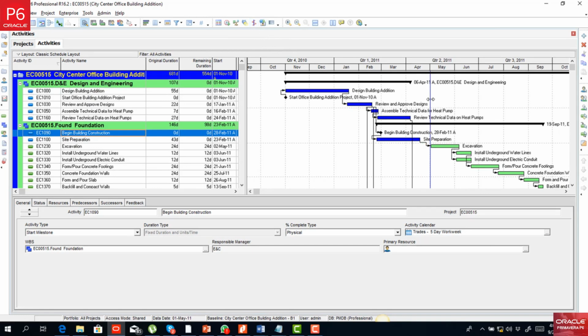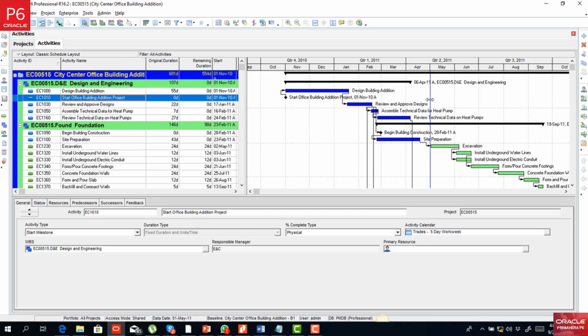Then just, on that particular project line, you're also going to see a particular line that is blue in color. That line now represents what we refer to as our status. In other words, this is our status line. So the status line helps us to determine essentially where we are at the moment with respect to the project. And like I mentioned earlier on, we're going to see how all of this plays out much more later.